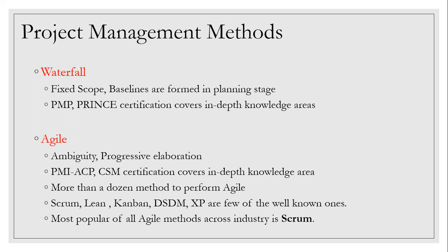Maybe in 4 weeks of time, we launch the basic version. Okay. And then we watch the market. We get the user feedback. We see how the product is doing. We watch our competitors. And based on all of that, we keep on giving new features in every new version we generate. And that's why when you restart your smartphone, once in a while you will see that certain apps, 4 or 5 apps, need updates, right? And all these updates are basically either bug fixes or new features to be added, and all these products are agile products. Okay.